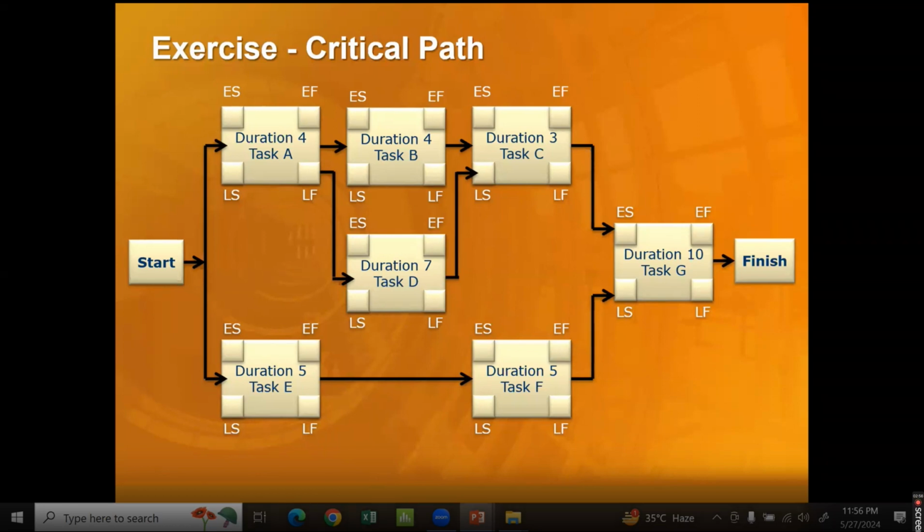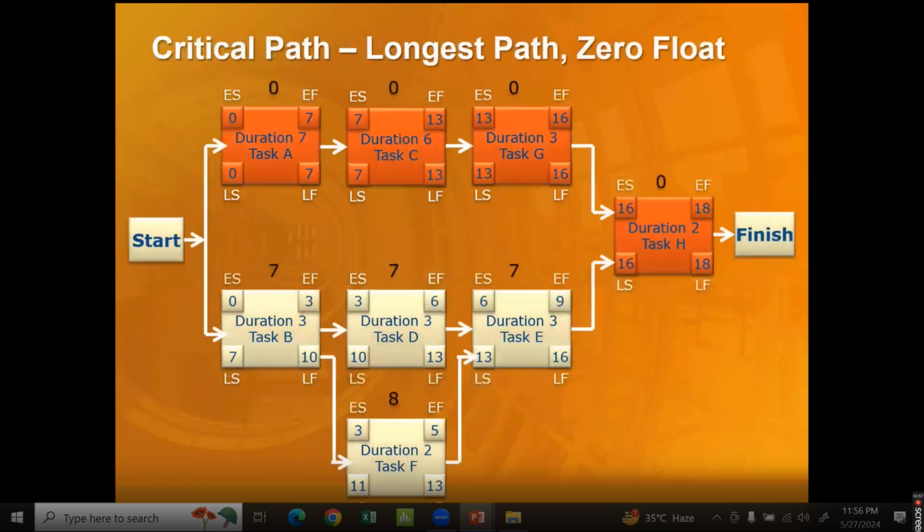Whenever you start doing the scheduling for every deliverable, you do this for whichever portion you're doing. In the previous example, between two tasks we have 1 day, and the other task we have 7 days free float. So can we consider we have 8 days of free float? No, it's between two tasks only. For project duration, you're only going to be looking at your critical activity, the critical path. Yes, the critical path for the project. Thank you very much.